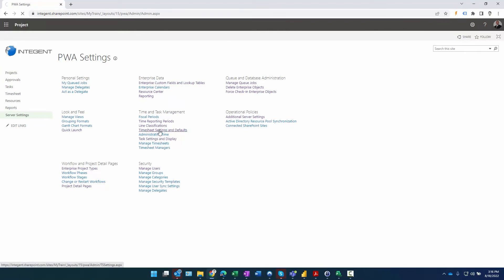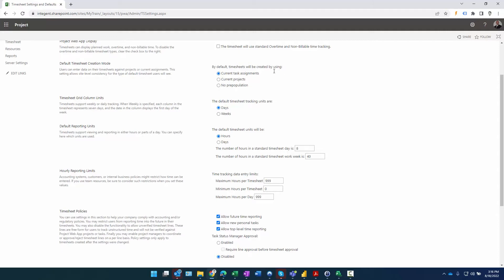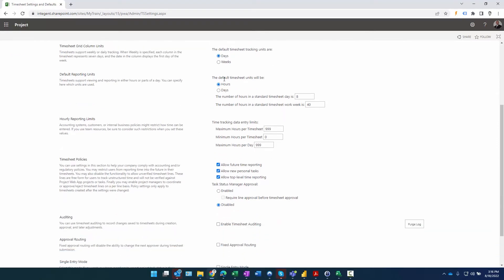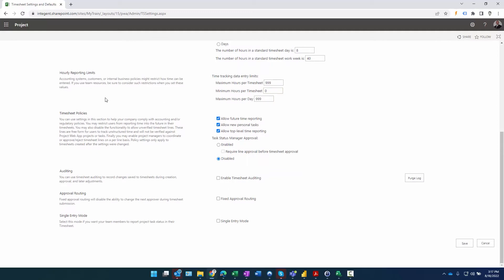Under Timesheet Settings and Defaults: timesheets will use standard overtime and non-billable time tracking - I'll keep that. I don't want team members entering overtime or non-billable time by default. Timesheets will be created using current task assignments, meaning tasks from projects occurring during that timesheet period will be pulled in. Default time tracking units are days, but we want hours entered by team members - standard day is eight hours and standard workweek is 40 hours. The max hours per timesheet can also be specified; I'll leave those defaults alone.